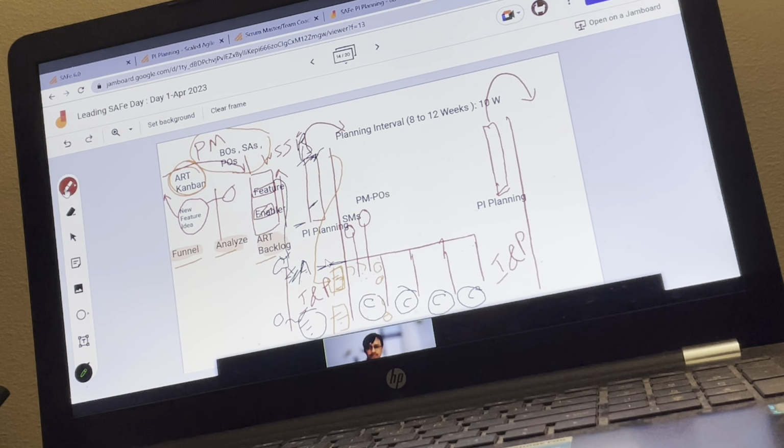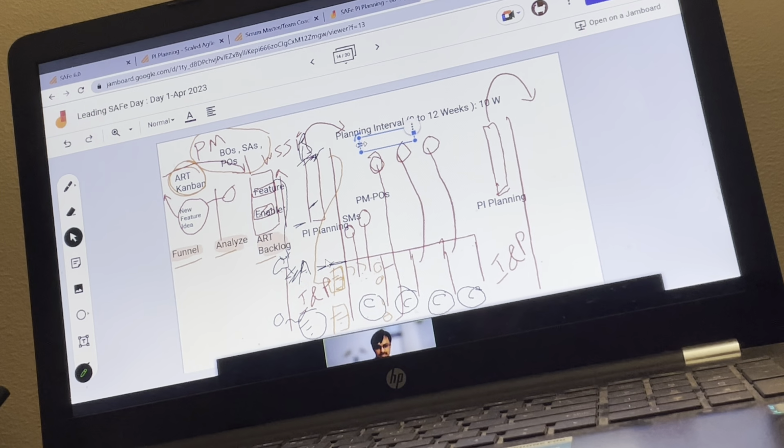Then you learned the system integration. Once this work is over, we are also expected to have a demo after 2 weeks. These demos are repeated, meaning every iteration we should have a demo, and these demos are called system demo. We'll learn about this in our slides, as this is another event which helps us know whether we are on track, because we have learned that working software, working systems are the only measurement of progress. We can't just rely on everybody in a sync up meeting saying everything is good. We need to see the demo. So periodically we need to have a demo.